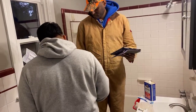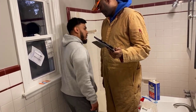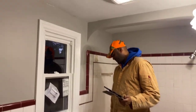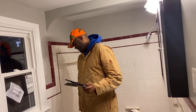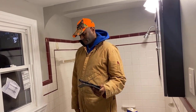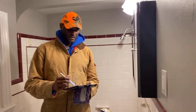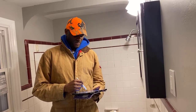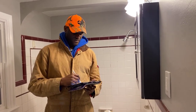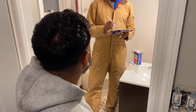One thing that I noticed that we have to do is we gotta put something here, and then push it down, because that's when we have our inspection, they're gonna point that out. So let me write that down. Maybe seal it up, because truly, what is that connected to? Nothing now. It was the radiator. We can tap it down and close it. Add to plumbing. So we know we got JT coming out tomorrow for plumbing. Check plumbing and verify flushing of all toilets, sinks, and drains.